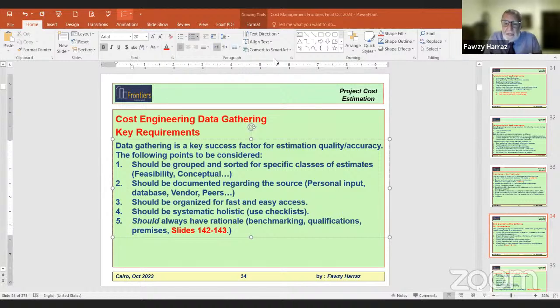So the rest of the story is they had to comply with the government rules and choose the lowest bid, which was KBR at 175. Once the commercial bids were opened and KBR knew the other bids were 250 and 255 million, they knew for sure they would have a losing contract. So they started to make stupid decisions on how to cut costs. And one big item in these projects, this is a gas field development, is the equipment, material, and specification. Some part of the plant had to be stainless steel to resist corrosion, but they decided to make it carbon steel. And they started bringing cheap engineers from Romania instead of the expensive engineers, and so on and so on. And the project started suffering severe problems.